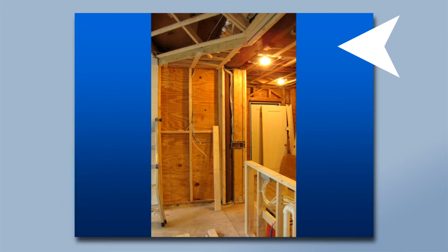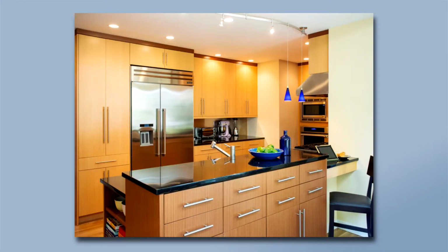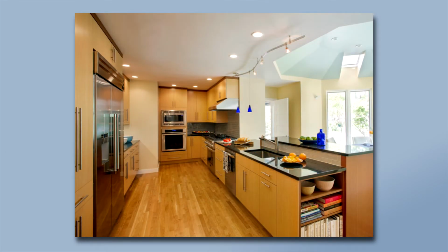And now you can see the piece of steel, and the column is missing. You can see that the whole feel changed, but we were able to give the client the option. We showed them a good option, but they decided, if we're going to spend this kind of money, should we actually spend a chunk more money and take down this column, which again had plumbing in it. It required a lot of steel work. This really added a month to the project, but they felt it was a worthwhile shift and change, and created a much more open floor plan, which they really desired.